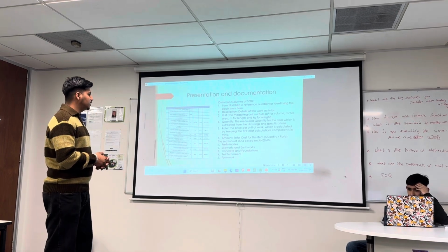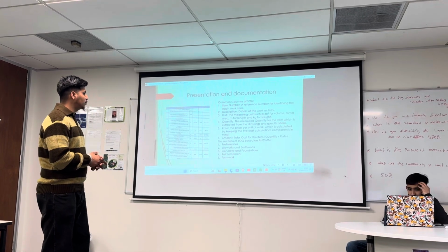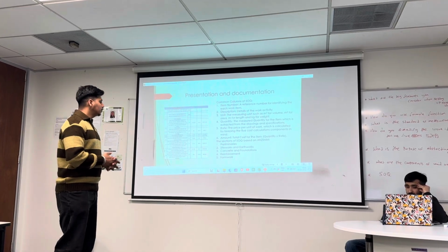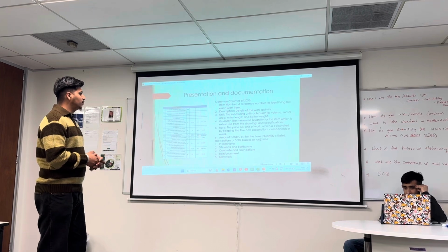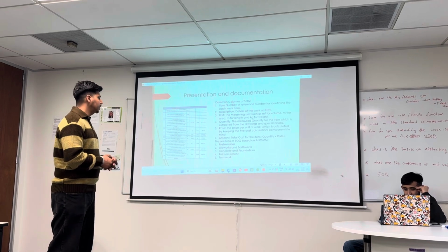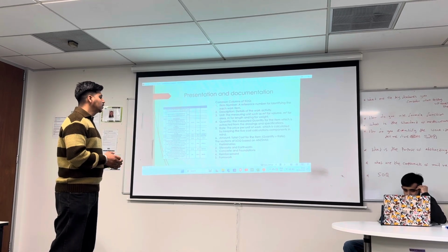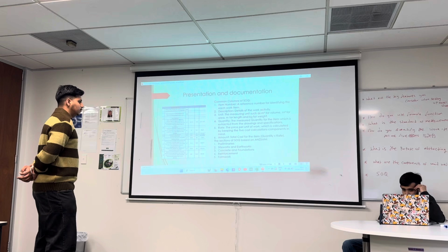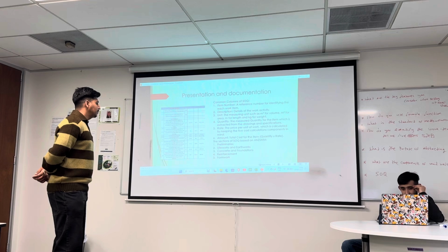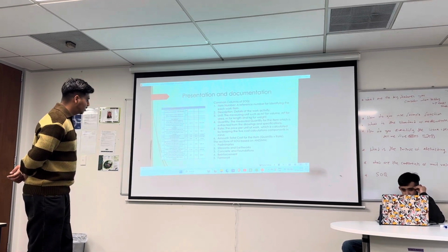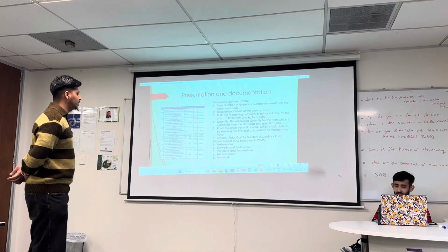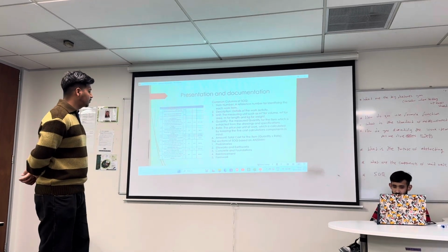Fourth, we have quantity, the measured quantity for the items, which is extracted from the drawing and specification. Fifth one is the rate, the price per unit of work, which is calculated by keeping the 5 cost calculation components in mind. Then we have amount, the total cost of the item, quantity into rate. Then we have the sections of SOQ based on ANZ SMM: preliminaries, site work and earthworks, concrete and foundation, reinforcement, and the last one is formwork.